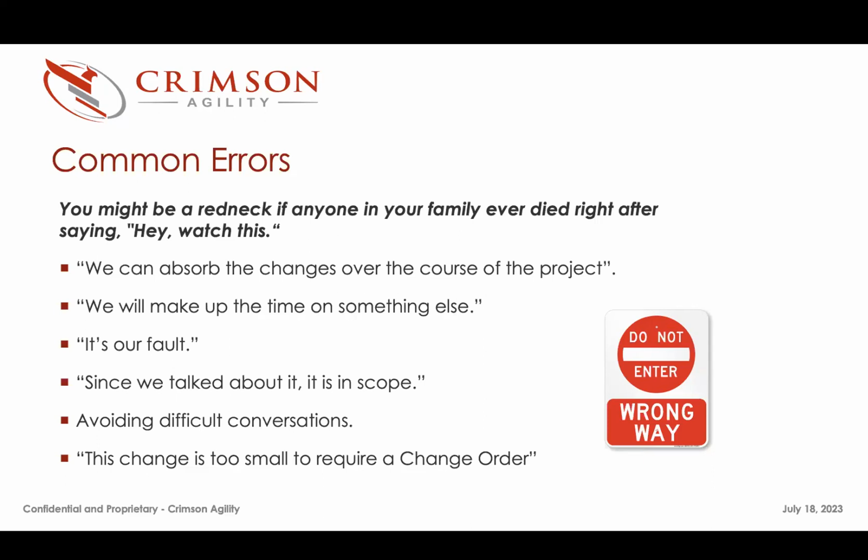We also sometimes avoid the difficult conversations. We put off creating the project status report. Or the last one is, this change is too small to require a change order, right? There's a small, maybe they just want to install a third-party extension. I'm not proposing that we create a change request or a change order for a third-party extension, you know, for 2-3 hours, whatever that's going to take. But to not call it out as out of scope and not highlight it in a project status report as something that we may add to a future change request could be a mistake. You know, it's very easy to die the death of 1,000 cuts if you start to ignore or sweep these little changes under the rug.